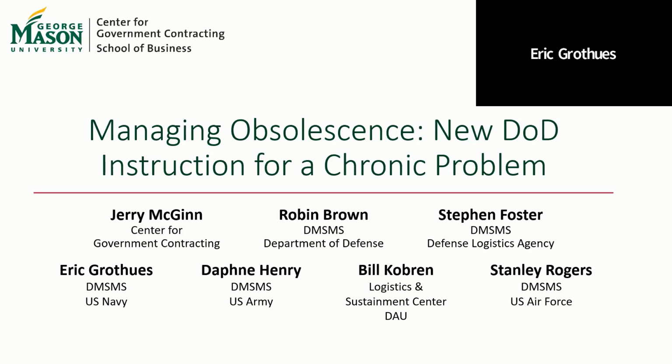Third, the requirement for a DMSMS management plan requires the PM to think through the processes, develop them and document them. And it makes the PM accountable too, because in the Department of the Navy, we do independent logistics assessments. We go through and assess our programs at the key milestones, Milestone C, full rate production, and out through sustainment. So the PM and the PM staff have to maintain their process and keep their plans going.